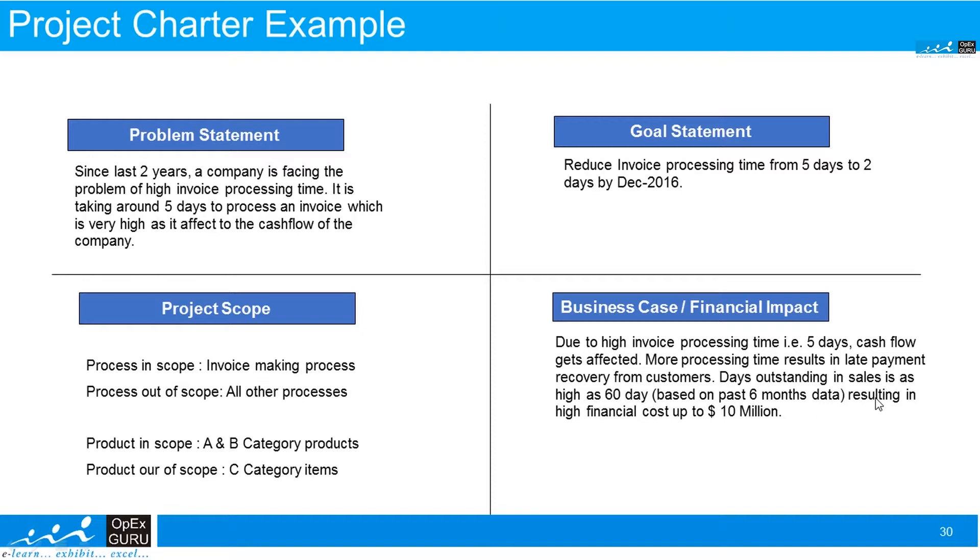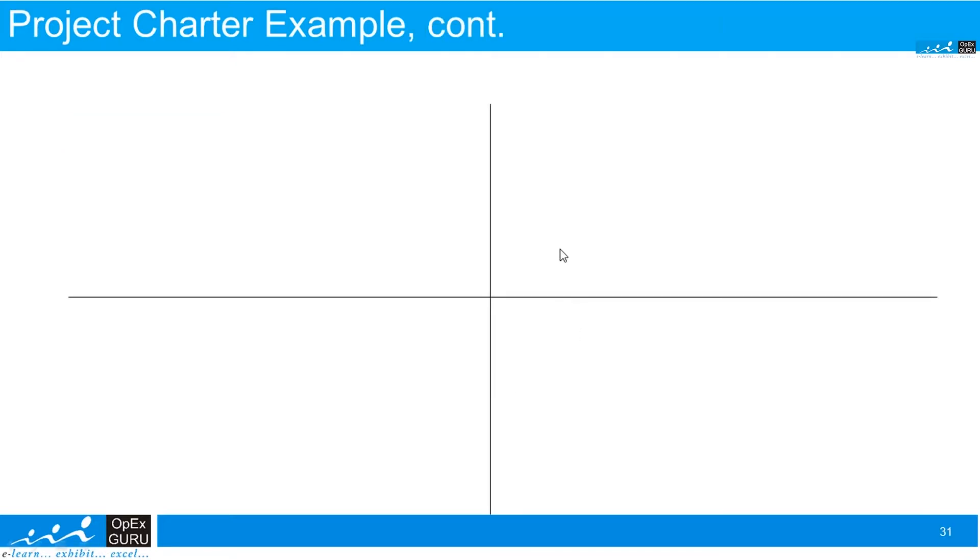As a result of this, the company has to borrow finances from other sources which is costing the company up to 10 million dollars. What is the benefit if we do this project? If we reduce this from five days to two days, the company has a potential to save around 1 million dollars. So this is the financial benefit.